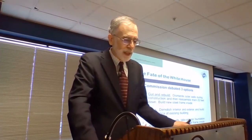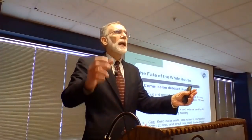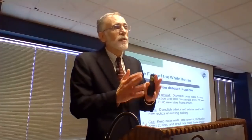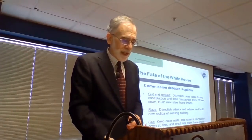So the commission debated three options. One was to gut and rebuild the White House, so to basically dismantle the outside walls, gut the interior, build a new steel infrastructure, and put the exterior walls back in place at the end. Second option was to demolish the interior and exterior and just build a replica of the White House, not save anything from the original. And the third option, which they ended up going with, and the president was pretty adamant about this as well, is to keep the outer walls in place, gut the interior totally, and build a new steel infrastructure inside, preserving the exterior white sandstone walls.